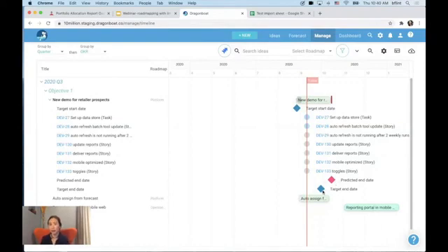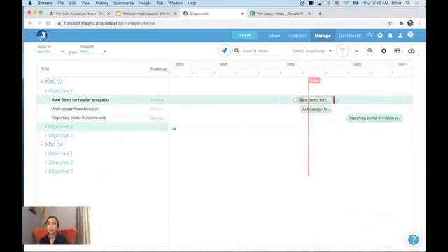So as a program manager today, we go through multiple iterations of planning. First level planning is we have a list of things that we want to do. We prioritize them. We have t-shirt sizing. And the second part of the planning is to say, okay, now we have t-shirt sizing, and maybe we have some dependencies. So we need to see how the roadmap fits together, right? So that's basically what we did earlier, which is how the roadmap is coming together. So what it gave us is not something to say, hey, this is something we know for sure we're going to hit, right? It's like a first baseline.